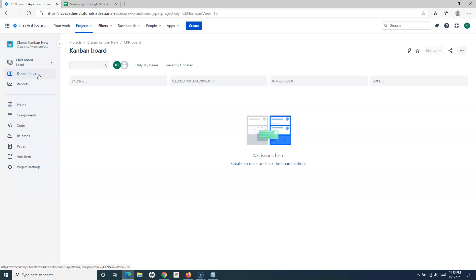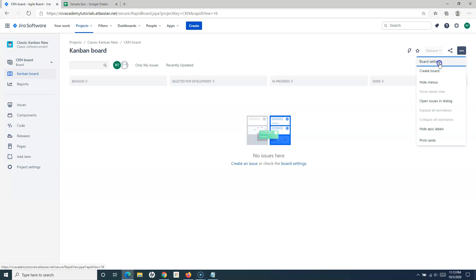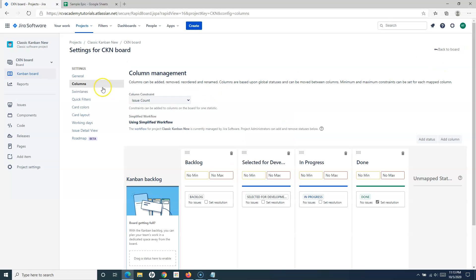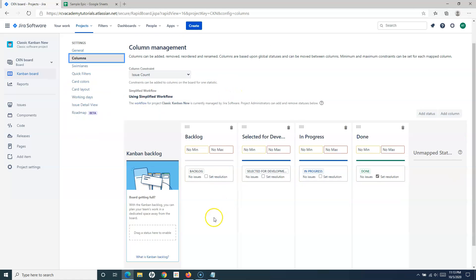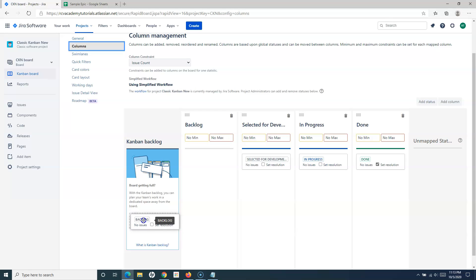I'll again explain the steps to enable the backlog in this tutorial as well. If you are in the classic Kanban project and you can't see the backlog, what you have to do is simply go to the three ellipses on the right, go to the board settings, and in the board settings you will have the columns. In the columns, you simply have to drag and drop the backlog status into the Kanban backlog.